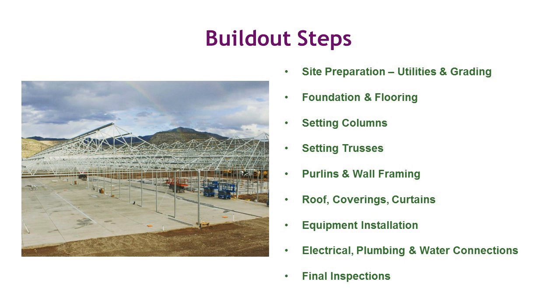I'd like to point out one thing here, and that is utilities can be extremely expensive to bring to a site if you don't already have them. So one of the things we probably should have mentioned in site selection is you really want to try to have a site that already has enough electricity to that site. It's very costly to bring it a couple miles down the road.